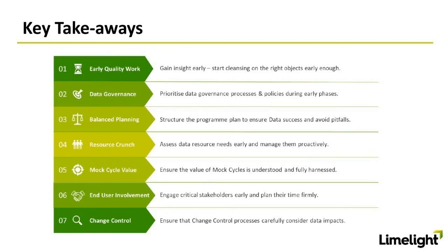Then Gordon touched upon the mock cycle value. There is no point doing a mock cycle load unless you're learning from it and you're improving the cycle as you iterate through that model. Otherwise, you're just doing it for the fun of it, quite frankly. Your mock cycle and the processes you move through must add value to the next mock. That's the whole purpose of why you do it. You must improve the quality. You must improve the load processes. You must improve the timing. You must improve your knowledge of the data. You must learn continually through that mock cycle, eventually to the point where you're comfortable to sign off that data through the cutover and ultimately the go live and dress rehearsals, etc.